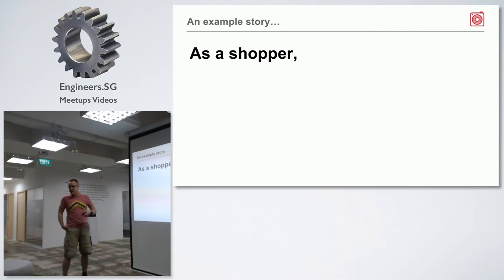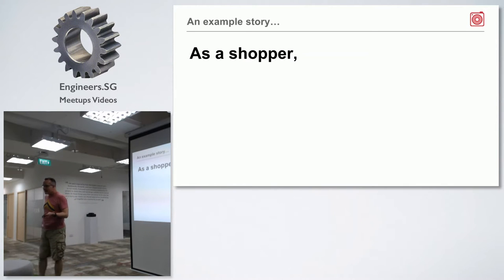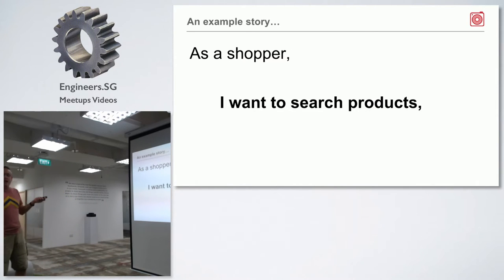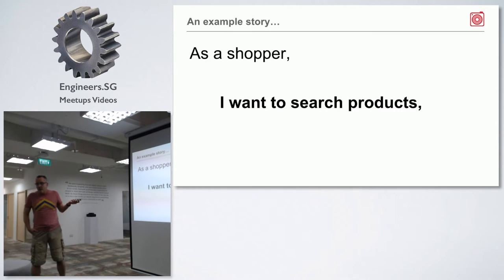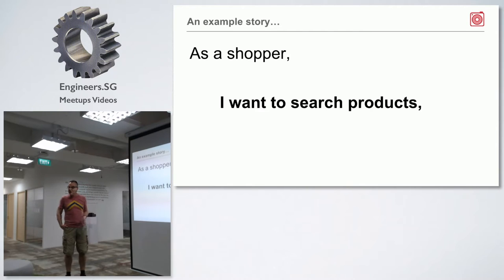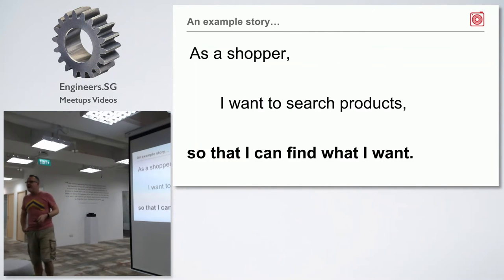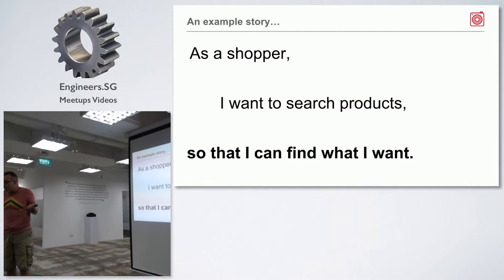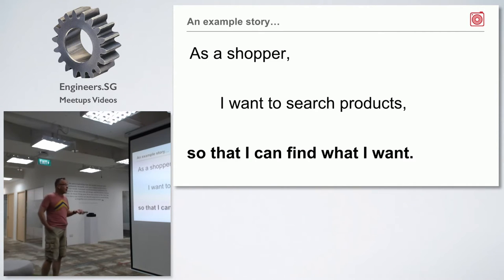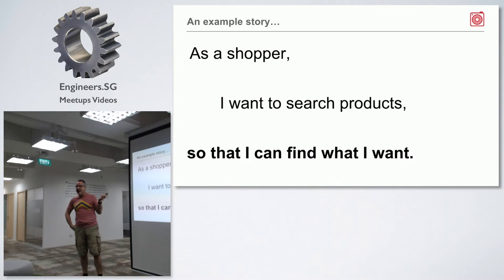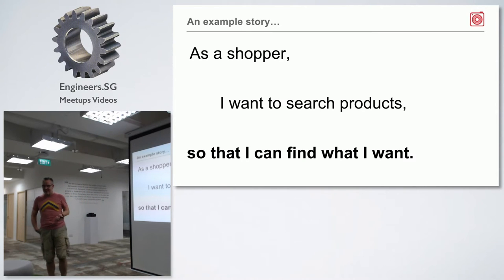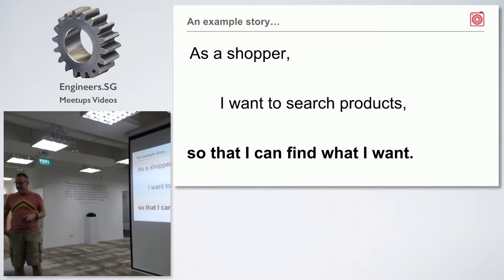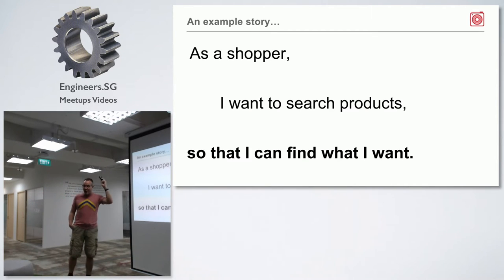Let's walk through a concrete example. As a shopper — so we're dealing with some kind of e-commerce site — I want to search products, so that I can find what I want. That's a very simple user story. Now, this is a very high level user story. When you start off with this, this is the kind of story that then needs to be broken down, because this is really big.